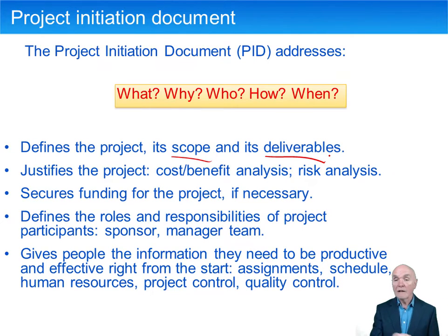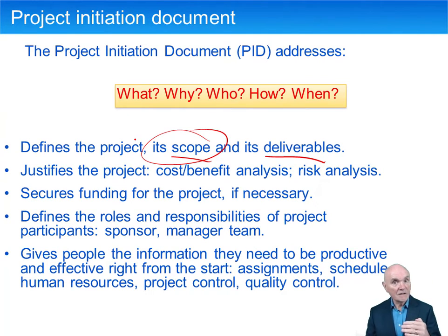We simply can't afford it. Say to somebody else, you're going to get that and that, but you're not going to get that. This is how you define the scope of the project at the start. And it means taking hard decisions at the start. It means entering into a dialogue and maybe heated arguments with people at the start. But that's far better than trying to ignore the inevitable, that not everyone's going to be pleased.